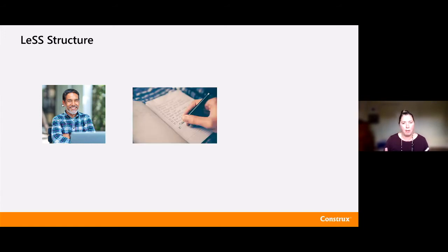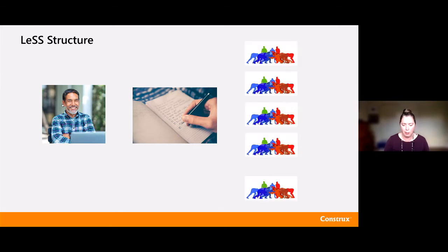They're all guided off of a single master backlog. So I have a single product owner with a single backlog feeding the up to 8 teams to deliver value. And they all share one common definition of done. What does it mean for us to declare the work done inside of a sprint together as this collection of 8 teams? There's one shared definition.